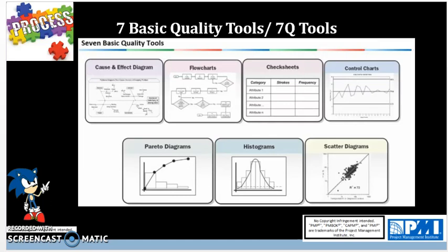which is a line in the diagram that shows the cumulative line of adding up to 80%. And if you see here, you would focus on the minimum number of causes that would cover 80% of the problem. So if you had 3 out of 4 of the root causes affecting 80% of the problems, you would focus on these and you would minimize the problems down the road. That is the essence of the Pareto diagram, manifesting the Pareto principle, which states that you will solve 80% of the problems by focusing on 20% of the problems.